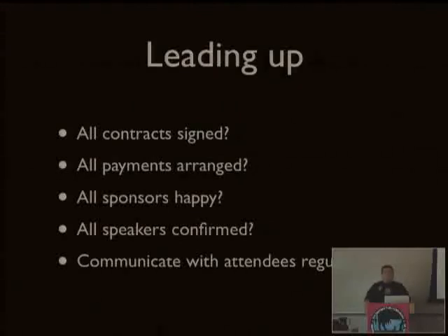Leading up to your event, leading up to day one, are all the contracts signed? If there's anything that the Perl Foundation needs to sign, if you're entering into a billing agreement with a venue and they want a contract signed ahead of time, then you need to get that to me as early as possible. Don't send something to me the day before your event and expect to have it signed and faxed back to them the same day. So get that stuff to me as early as possible so that we can get the contract signed, we can get all payments arranged as soon as possible.